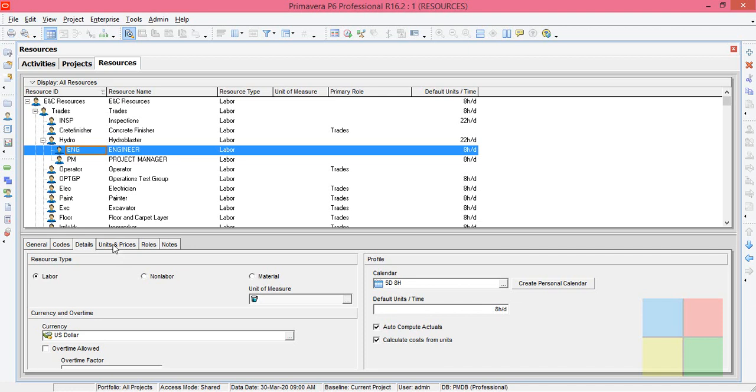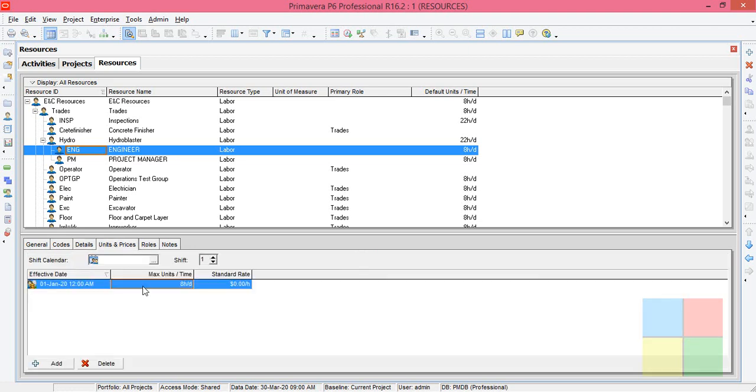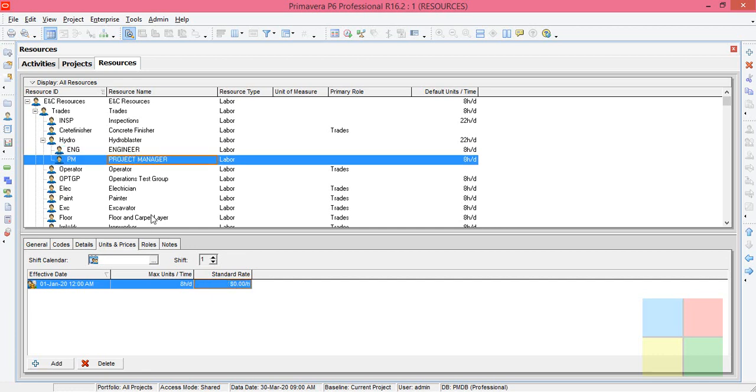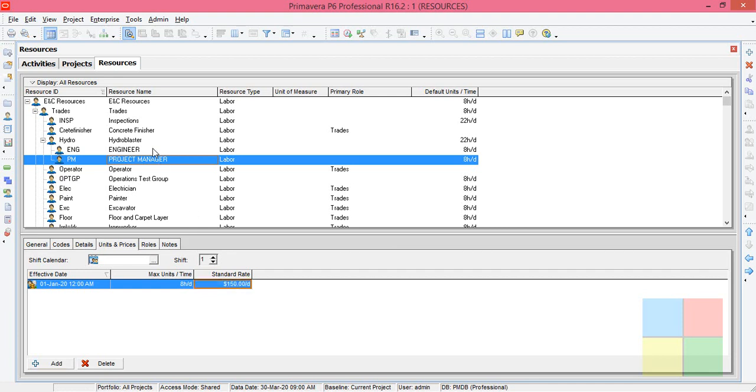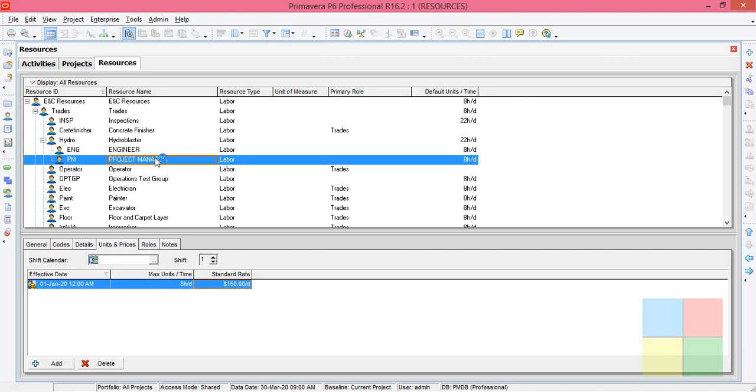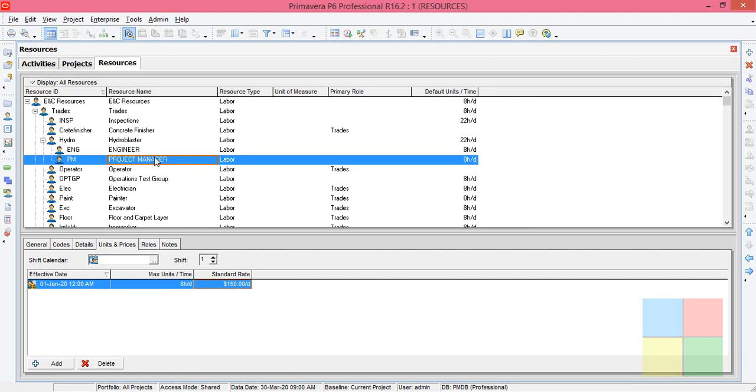Click on PM and I'll change the order. Now they are in the same order. Click on engineer then come to instant prices. We'll change the price of him to, let's come to 100 dollars per day. Again for the project manager, let's go with 150 per day. We have set the price.